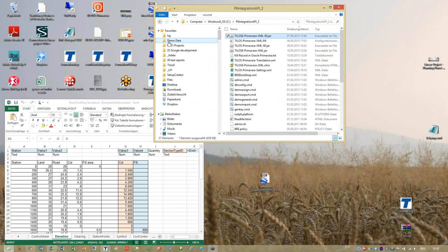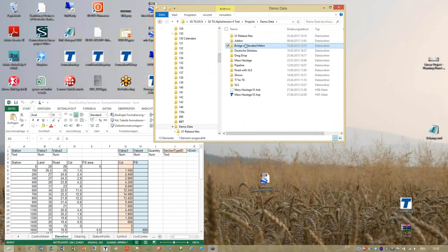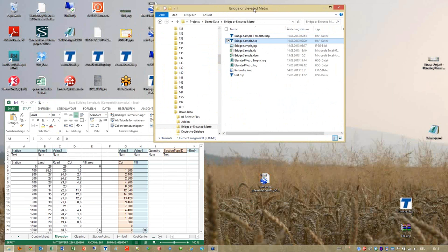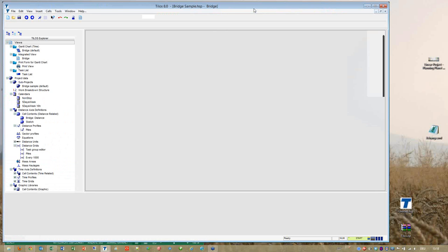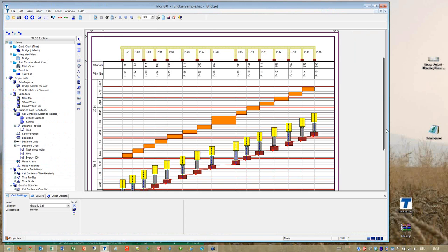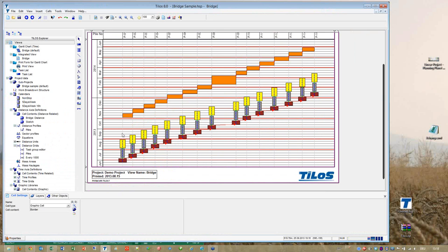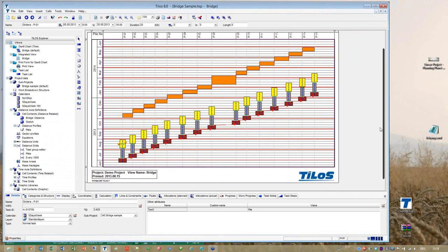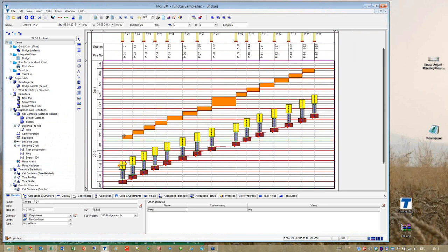And the goal, what we want to achieve, is we want to create a little plan that looks like this here. We got here a grid representing the positions of the piles. Then for each pile we have planned 3 activities, which is the foundation, the pile itself, and the girder. And this we do for each pile we have to build.